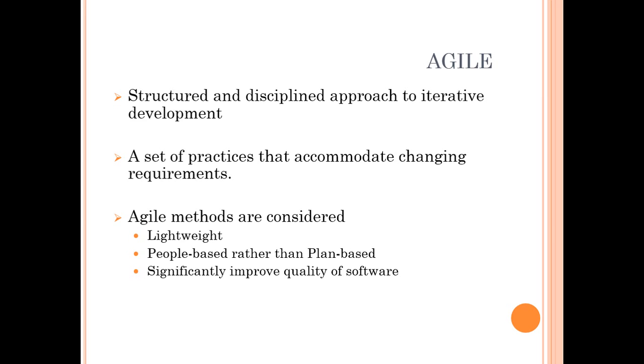With every new build, every daily night build, we trigger automation, and if anything comes up like a defect or problem, it will notify the QA team and they will post a defect. That's how we perform a regression. So we have directly cut down a 2 months regression cycle. We do it every other day through automation. So that's where quality comes into the picture. Just build it, immediately test it, and release it, ready to consume. That's the approach of Agile.